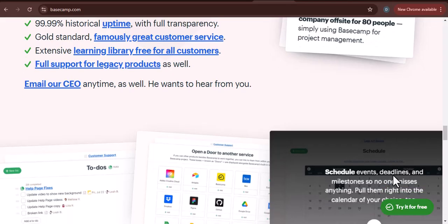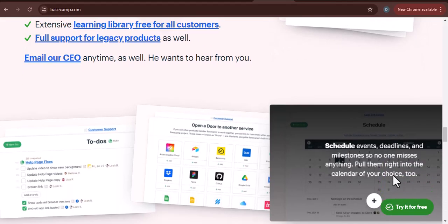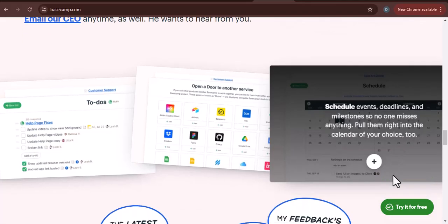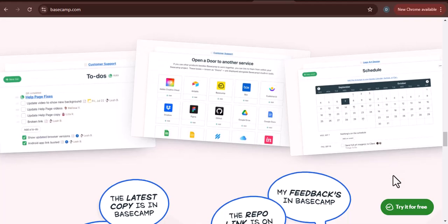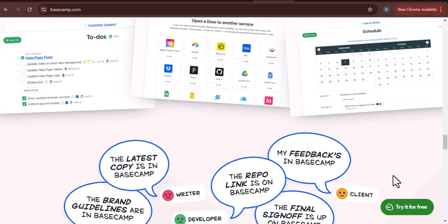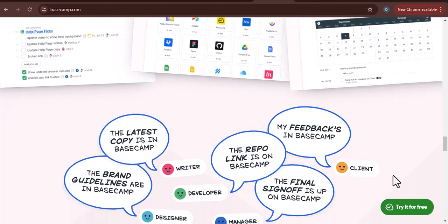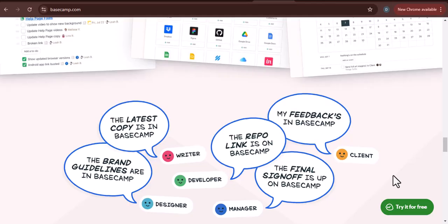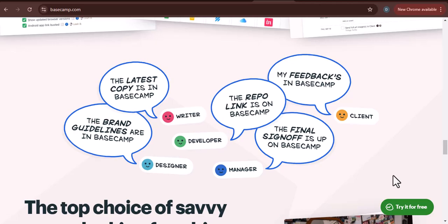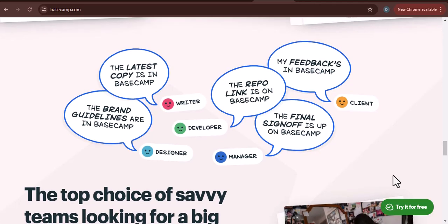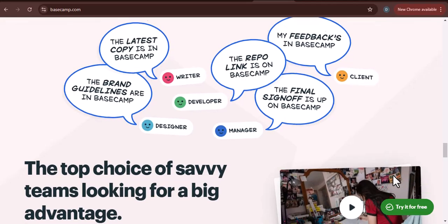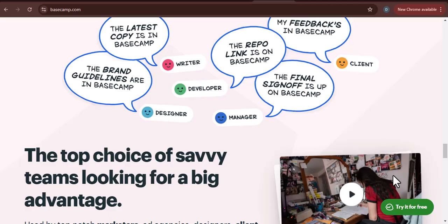Another internal Basecamp approach is to create a dedicated time log, to-do list, or a message board thread. Each team member could then create a new to-do or post a message daily or weekly, detailing the tasks they worked on and the time spent. For instance, a to-do might be "week of June 17th time log John Doe," with subtasks for each project and the time allocated. Again, this requires diligent manual entry and still necessitates manual aggregation for any meaningful analysis. It's a step up from individual comments in terms of organization, but still far from automated.